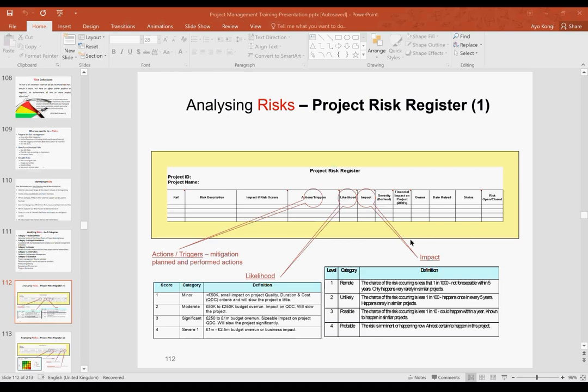Now we're going into what is the financial impact on the project. If that should happen, what is going to be the financial impact? The financial impact is an addition of 2 days, because we will now need to pay the delivery manager or project manager for the extra 2 days they will be coming for. You get? So we can say maybe £1,000 for the 2 days, and so we can put a financial cost to that.